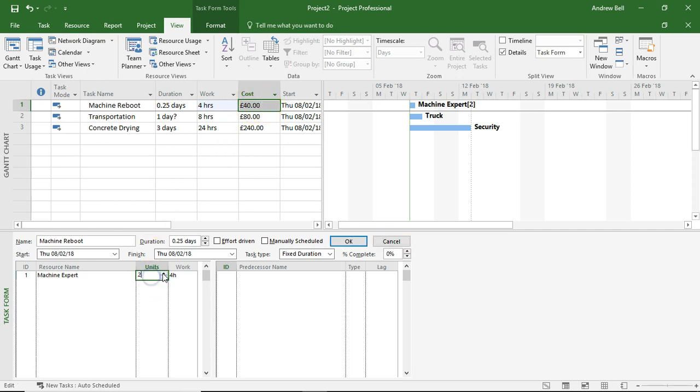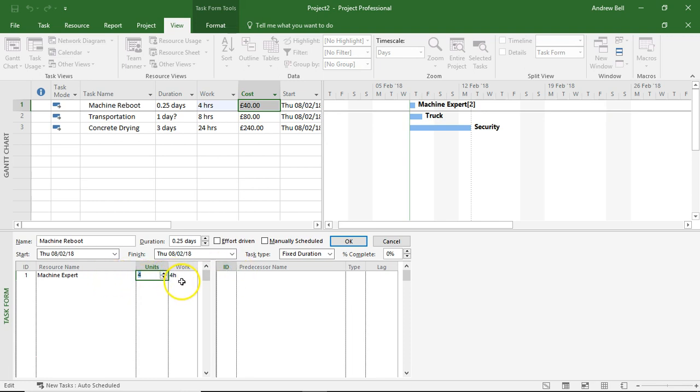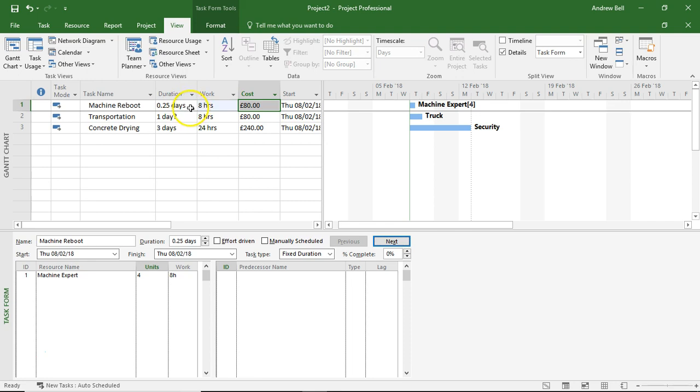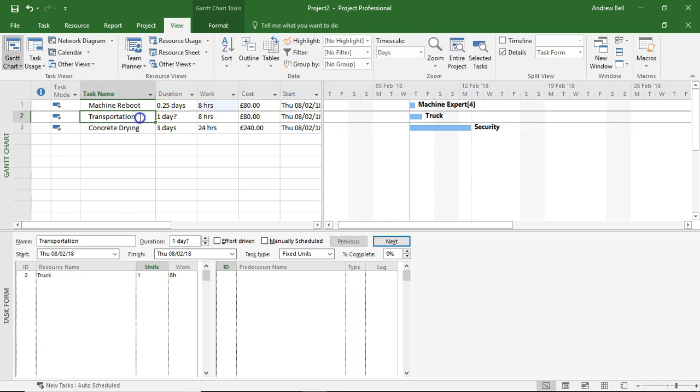Let's just do this again. Let's put four machine experts on this task. Machine's going to take two hours to do its work - doesn't matter how many people I've got standing around watching it. All I've done now is increase the work content on the task and the cost. The duration is still point two five of the day.